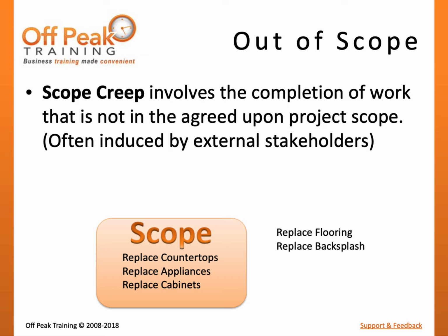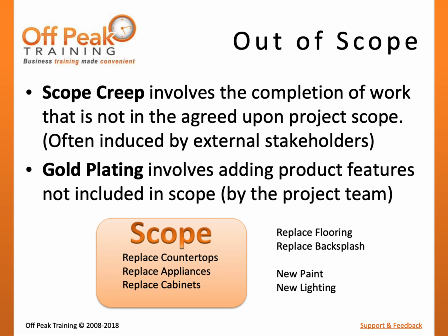When team members perform additional work on their own without prompting from external stakeholders, we call this gold plating. They may find an alternative method of doing work that they believe will add additional value. Again, they may not be aware of complications this can cause to their work or work performed by other team members. In project management, scope creep and gold plating should both be avoided. However, change is a natural part of project management. Therefore, change requests for scope are preferred.